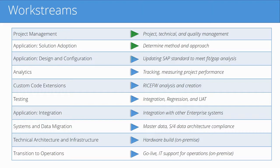Next, there's design and configuration. Throughout the process, the implementation team will be taking a look at SAP standard, and then they will be doing a fit-gap analysis to compare SAP standard with the needs of the organization and find where changes need to be made, either in the processes of the organization or with the SAP installation to meet the needs of the organization. Analytics will track and measure the project performance over time. Custom code extensions will be the RICE-FW analysis and creation, and oftentimes this is coming out of the design and configuration steps.